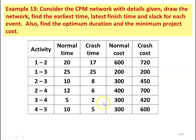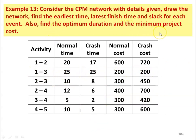The normal costs are 600, 200, 300, 400, 300, and 300. The crash costs are 720, 200, 450, 700, 420, and 600. Activity 1-3 cannot be crashed based on the conditions. In this example, the indirect cost is not given, so we take indirect cost equal to 0. We consider only the direct cost to calculate the total cost of the project work.